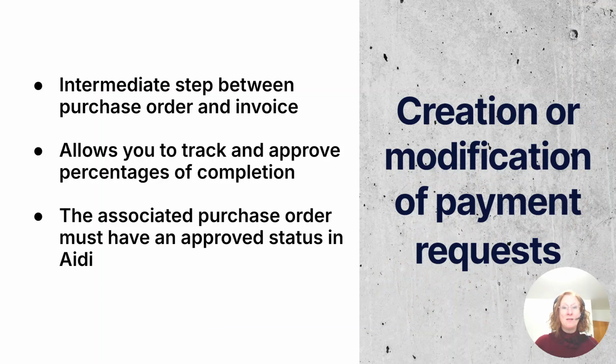The payment request is an intermediate step between the purchase order and the invoice. These steps may or may not be required depending on what has been configured in the purchase order. The purpose of the payment request is mainly to document and approve the quantities and progressive settlements by supplier, according to the specifications, and then invoice the amount linked to the percentage of completion.